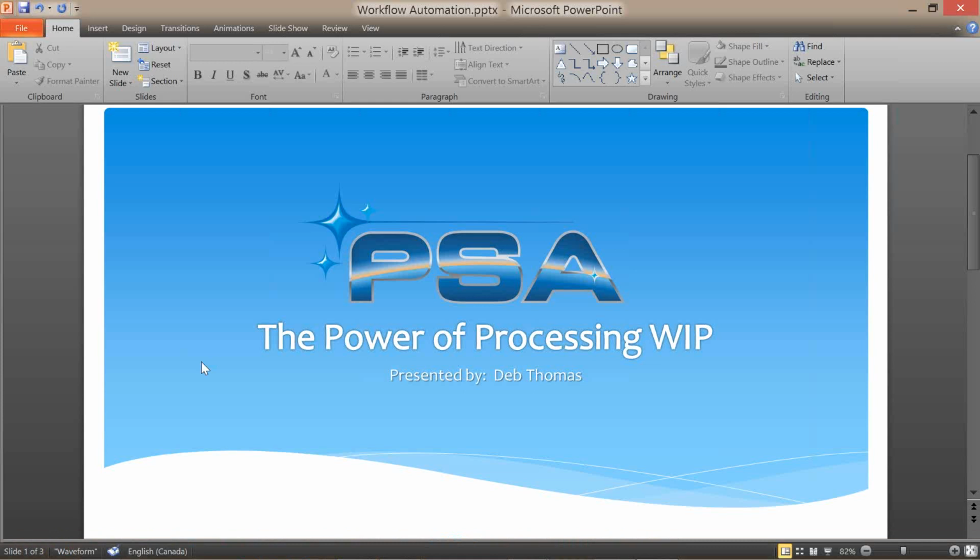And so George is asking if you run WIP calculator for April and then immediately run WIP calculator for May, won't it pick up costs in the proper month? Yes, George, you're correct. However, you need to run WIP revenue for April to close out any jobs that are appropriate in April. If you're under budget, you could be leaving money on the table that you can't close out until May if you've WIP calculated in May. So every month, you do WIP calculator followed by WIP revenue. Then you start WIP calculator for the next month, and everything works fine.